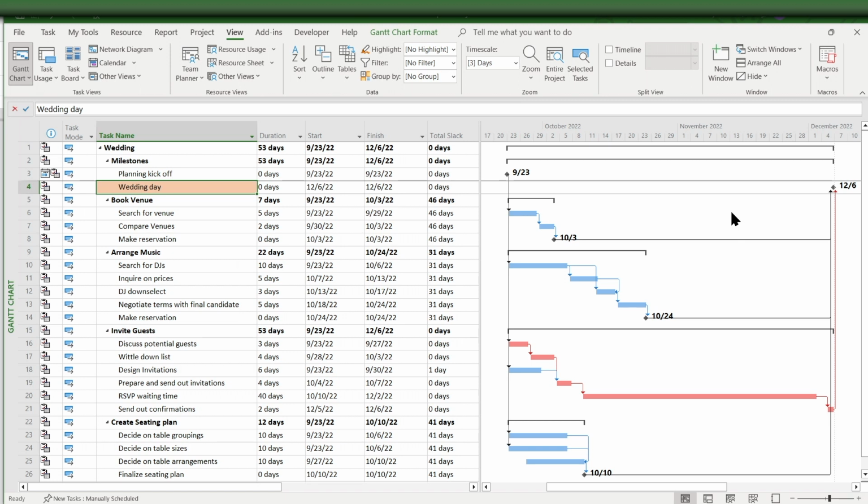There's this space here on these paths indicating that they are not driving our milestone and they are not the longest path. I've included this column here, total slack, as just a taster of what's to come. For a more technical solution of what a critical path is, we need to bring in this total slack column, but we'll discuss that in future videos.